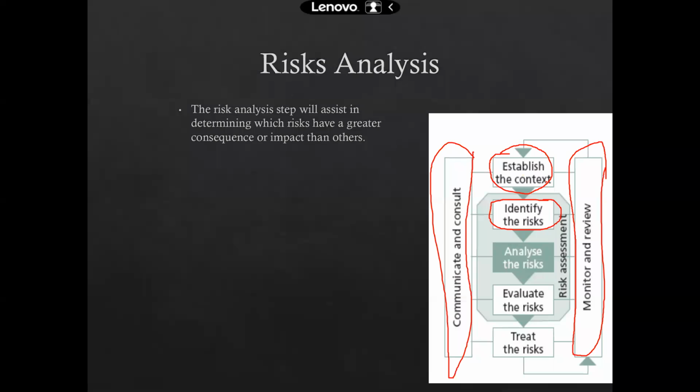In this lecture, we are going to see two things: how to analyze the risk, and how to evaluate the risk. I suggest you list down all the possible potential risks which you think you may face, either in the beginning of starting your venture, or during the startup. Then evaluate what their impact would be, and the probability of occurrence of each of those risks. This exercise should be done by you.